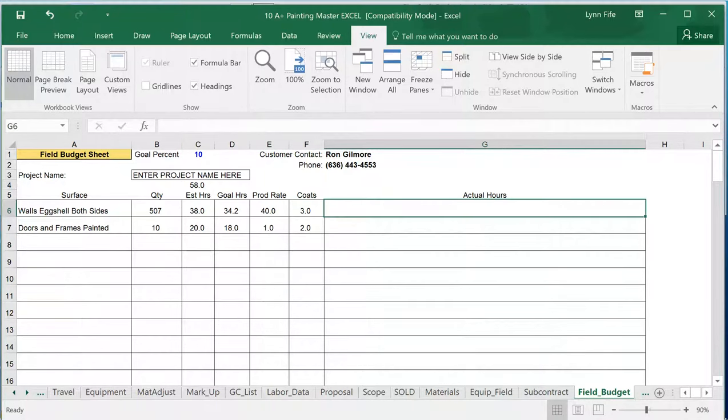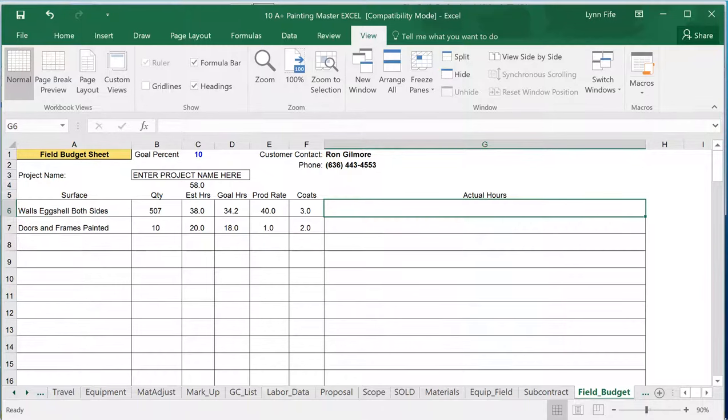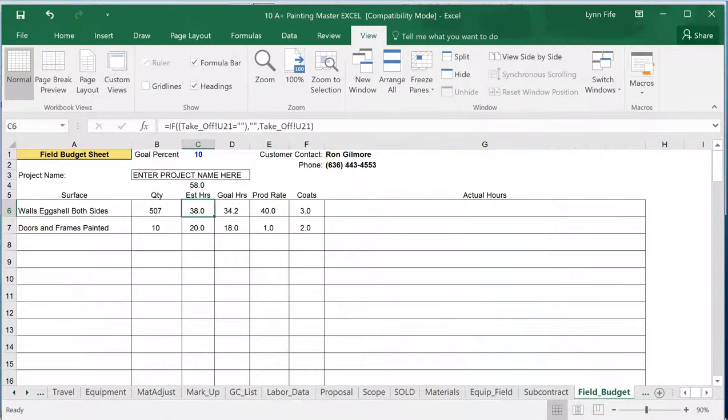In the field being a printed document, they would come out here and they would type in how many actual hours they actually had, or they can hand write it in, and that can be entered in by someone in the office, so that you can keep track of how many hours they're actually taking compared to your estimated hours to see if your estimating needs to be adjusted for future reference.